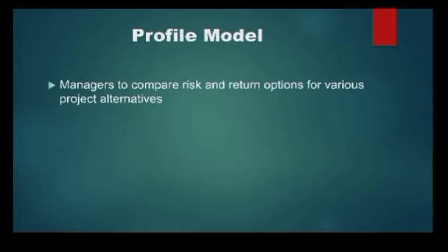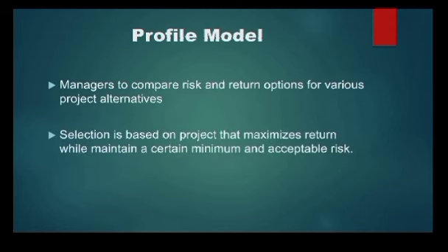With this model, it allows managers to plot risk and return options for the various project alternatives, and then they select the project that maximizes the return. So selection of the project is based on a project that maximizes return while maintaining minimum and acceptable risks.